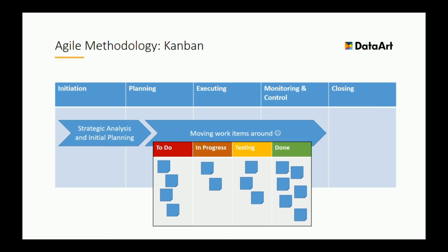But the idea is that Kanban actually introduces a restriction on the number of items that can be in a certain state simultaneously. So for example, in a Kanban team we can make an agreement that we can't have more than 2 items in progress simultaneously, for different reasons. I don't know, we have only 2 developers.